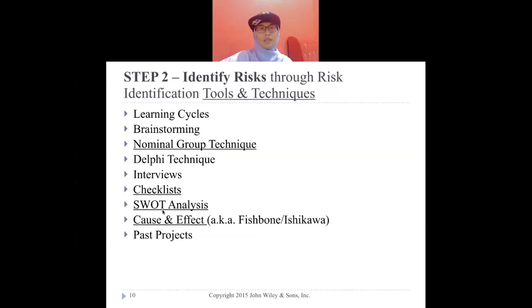So this is our opportunity to go into the development of applications. For example, what is the strength? All our people are very skilled. What is the weakness? Maybe all of our team is women. Later they give birth, take maternity leave. For example. So our team members are all female, so we need to have a backup plan if anything happens. That is an example of SWOT analysis, what may happen.